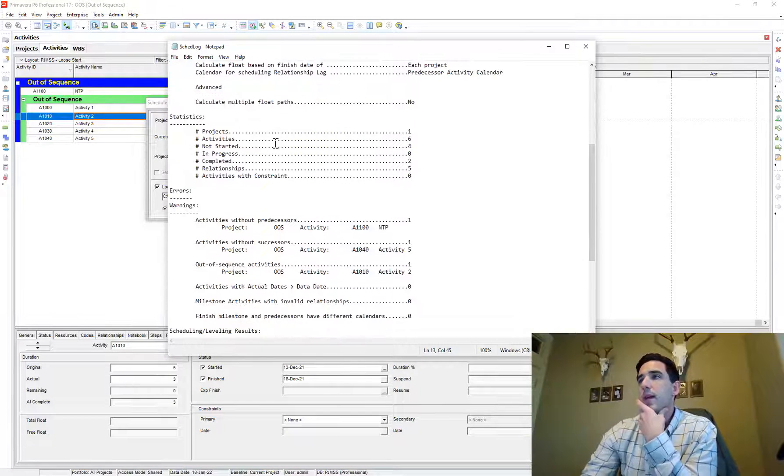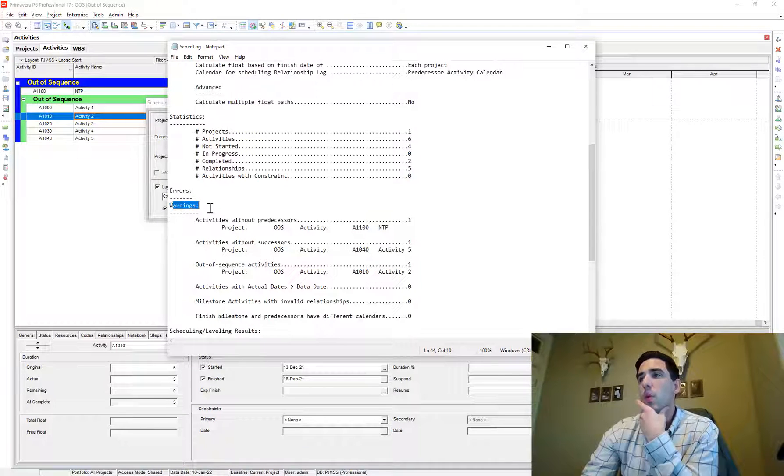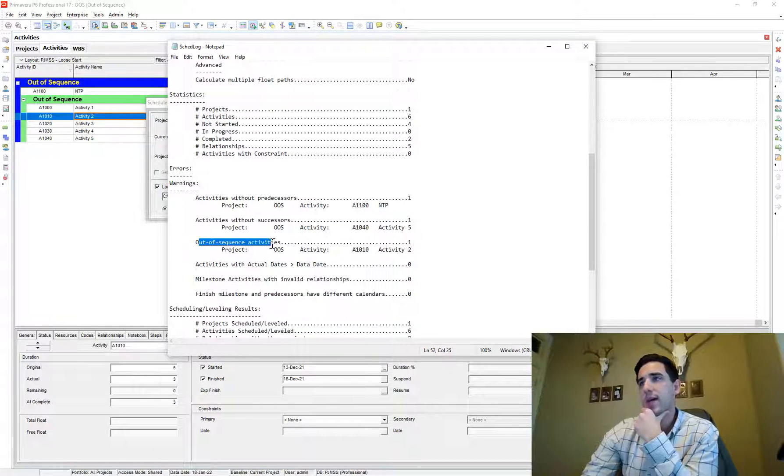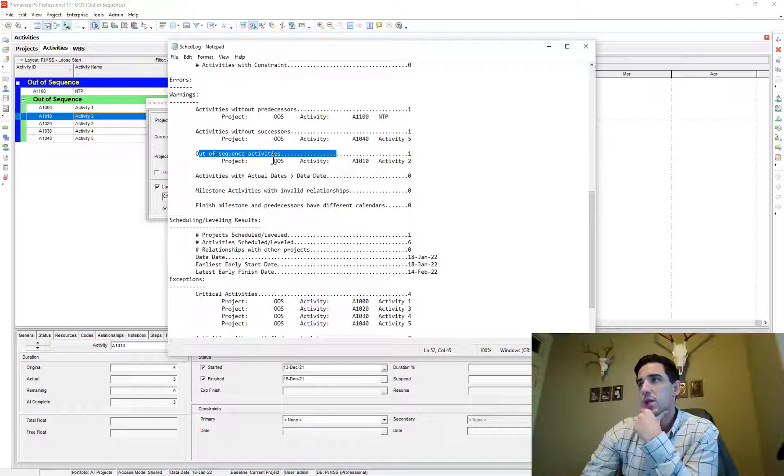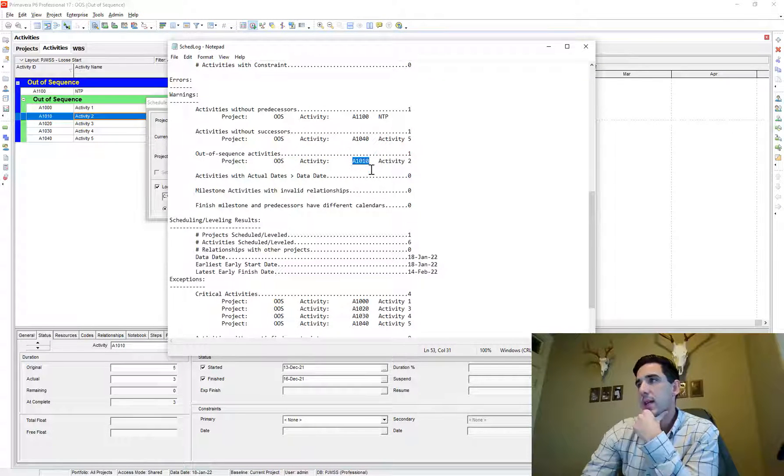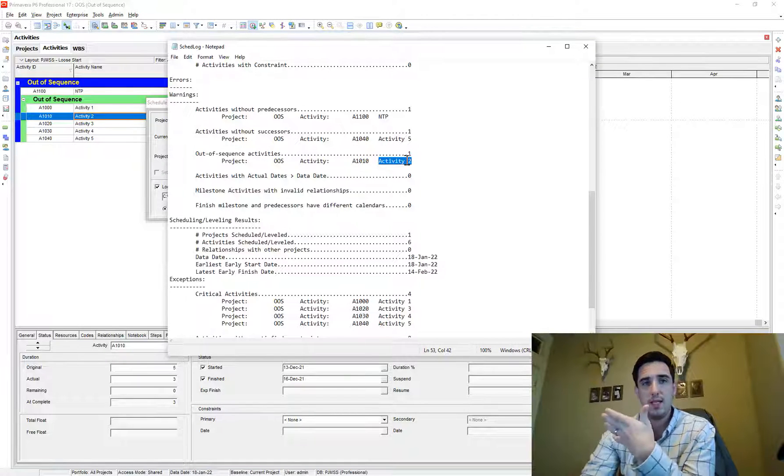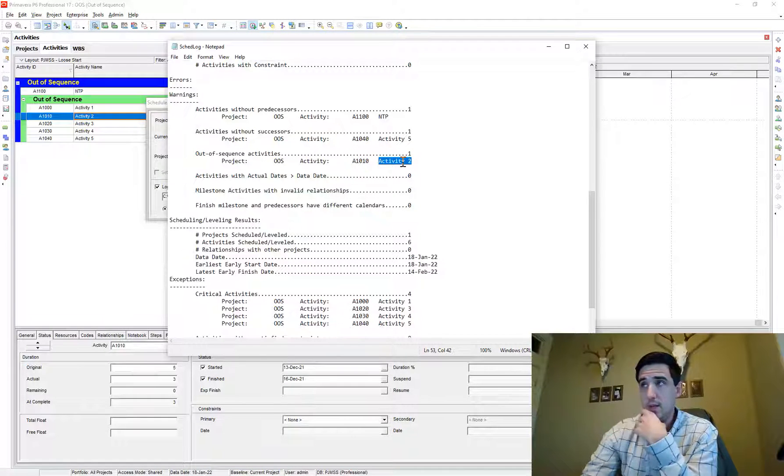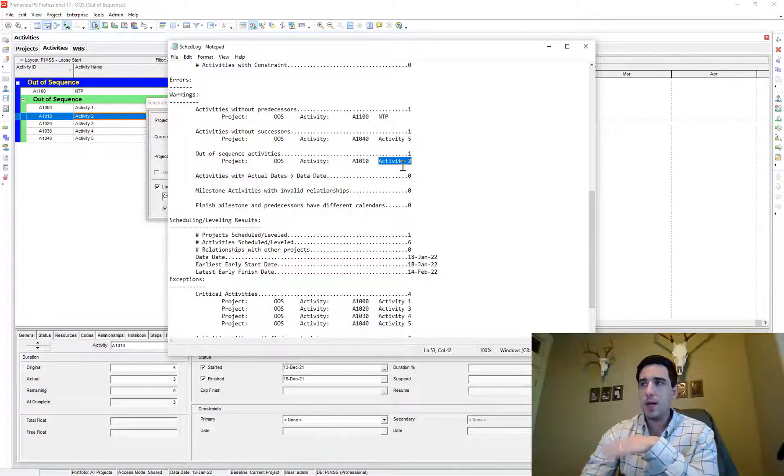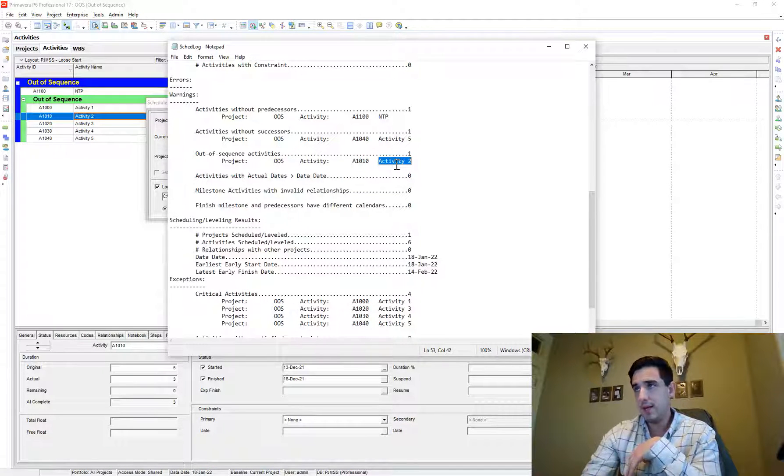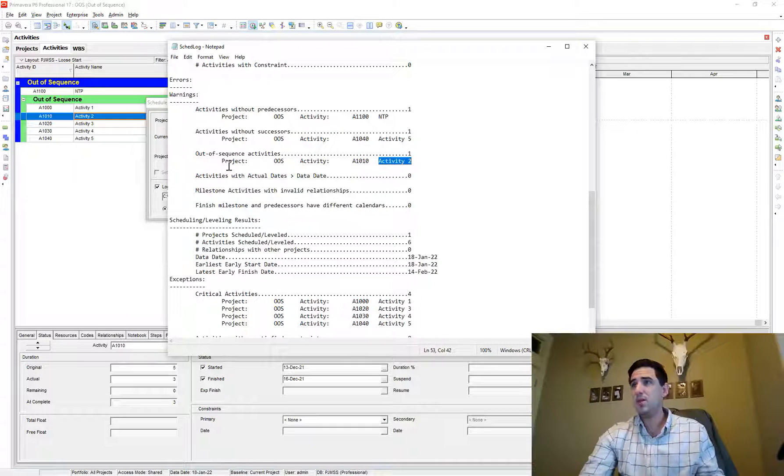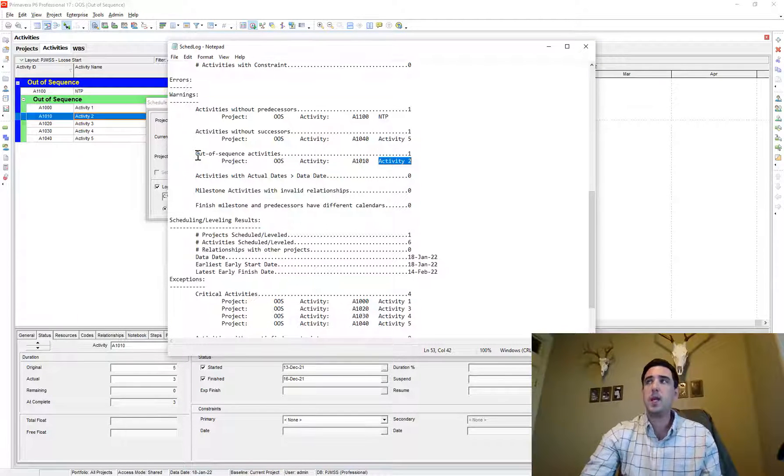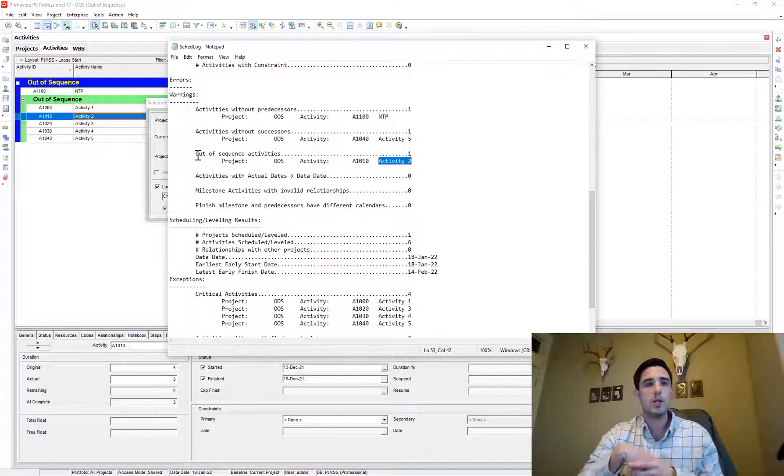And if I go down here, there's a section called warnings. And under that section, we have out of sequence activities. And so here is the activity ID and the activity description. And so we have one instance of out of sequence progress that needs to be corrected for on your project. Maybe there's a list of activities that get printed out.